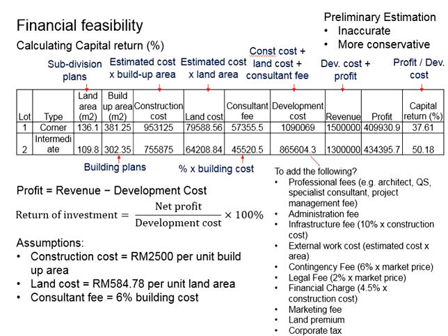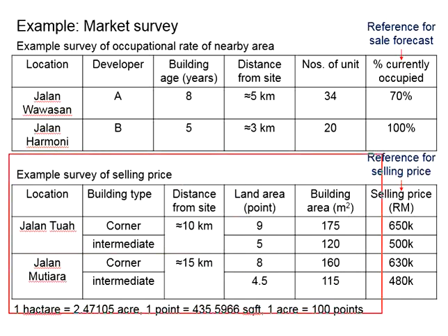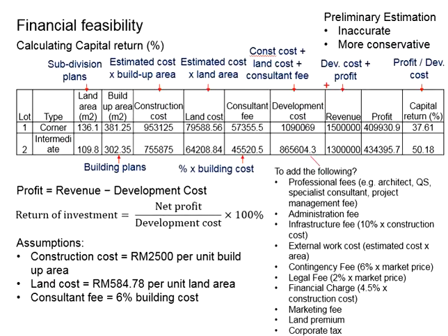Normally, this revenue here, we put it in the round number or any numbers that easily remember during the promotions. Bear in mind that you cannot simply set the selling price without taking into considerations about the market price. Remember previously in the economic feasibility study, you have done the selling price survey. Based on the survey result, you know more or less the market price. Then you can set your selling price with reference to those market price.